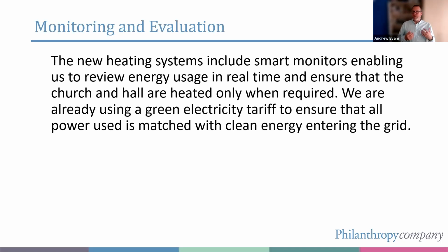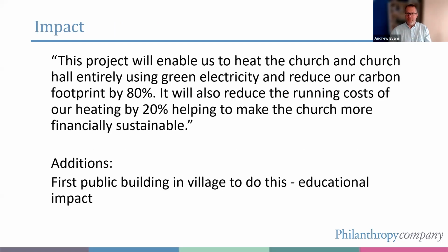With a project like this, it's fairly simple to work out whether it's successful. So the first measure of success is just going to be, we actually install the things we say we're going to install. So the heat pump and the pew heaters get put in and they're working. That's a critical one. But then also it's going to be, did you meet the things you said it was going to achieve back here? So you'll recall back here, we talked about the impact, reducing carbon footprint, reducing running costs.